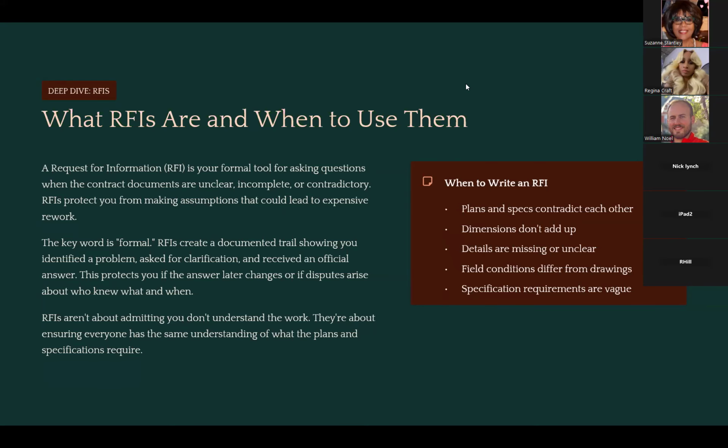So you would respond to the general contractor and say, yeah, I see that they changed the toilet paper holder to a different one. It's $50 more. I'm providing four of them. So, here's my change order for that amount.